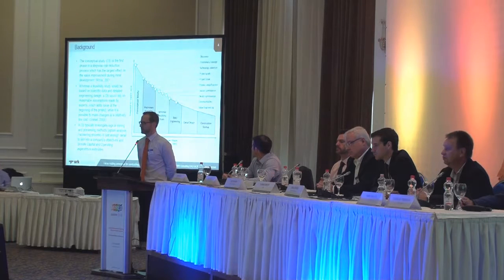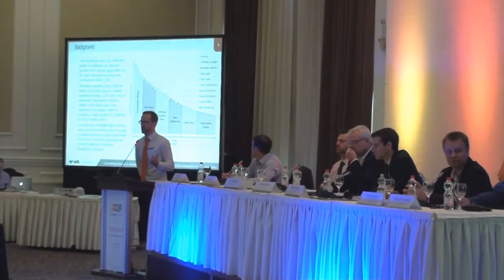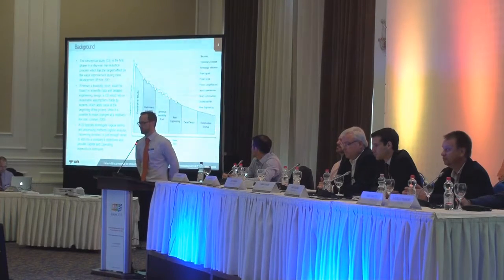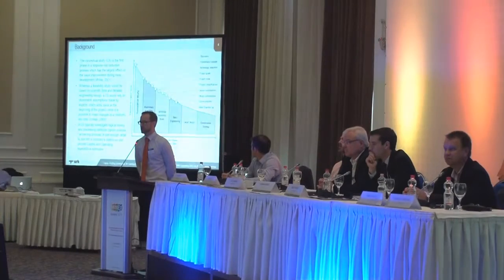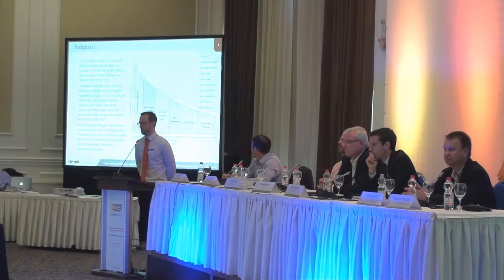So the graph on the right shows basically that conceptual studies is the first part of your three-phased approach to feasibility. Why do you have 3 phases? Well, with each phase you aim to reduce more and more risk in developing your mine. So the graph suggests that a conceptual study could potentially have the highest impact on your value of the project. So it can also be seen as a stepwise risk reduction process to mining.